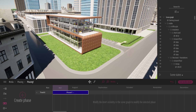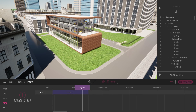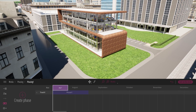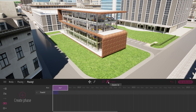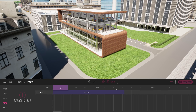Here is the new UI for this phasing tool. It's more like a construction schedule where you can create different construction steps and visualize the length of each step. By default, the starting time is the day you start your project — I'm recording on July 7, and by default my phase lasts around 40 days. You can see different months laid out. In the toolbar, the plus and minus allow you to zoom out for a bigger preview of the whole phasing, or zoom in to see individual days.